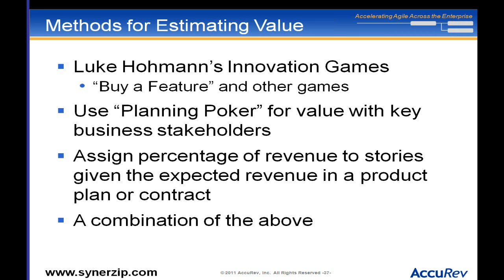Using that single assumption of product revenue over three years, you can calculate the value for any particular feature. That's another thing you can do. At the end of the day, the important point here is not the accuracy of estimating the value, but rather having a framework for saying: I'm going to get through these things as fast as I can with frequent releases, order them the best I can relatively speaking, and then whatever value you would have gotten, you'll get more of it faster.